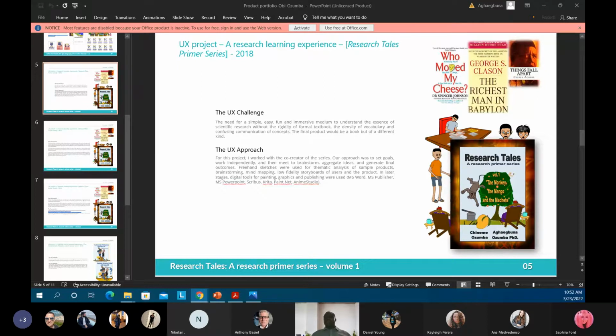Again, you see me mapping the project and determining who my key stakeholders were at that point in time. And the very first stage was the team members. Even though we didn't name one person to be the team head, we eventually agreed on situational leadership, so that we could now run the team.